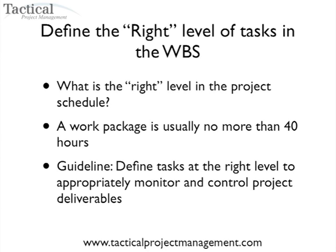The fourth lesson learned is to make sure you define the right level of tasks in the work breakdown structure. This is always a common question — what is really the right level in the Microsoft Project schedule? A guideline is that a work package is usually no more than 40 hours, but you want to break down the tasks into manageable chunks so you can accurately monitor and control the project deliverables.